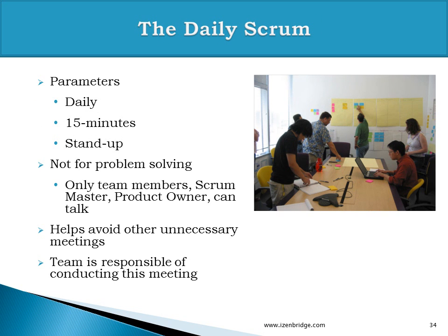Some parameters: it happens daily, at a fixed time. It should be time-boxed to 15 minutes. It is always recommended to finish the daily Scrum meeting in 15 minutes, even if everybody has not got an opportunity to speak about their work, because until we start practicing the time box, things will not improve. It's not a place where we start discussing one technical problem. This is not a place where all the escalation happens.